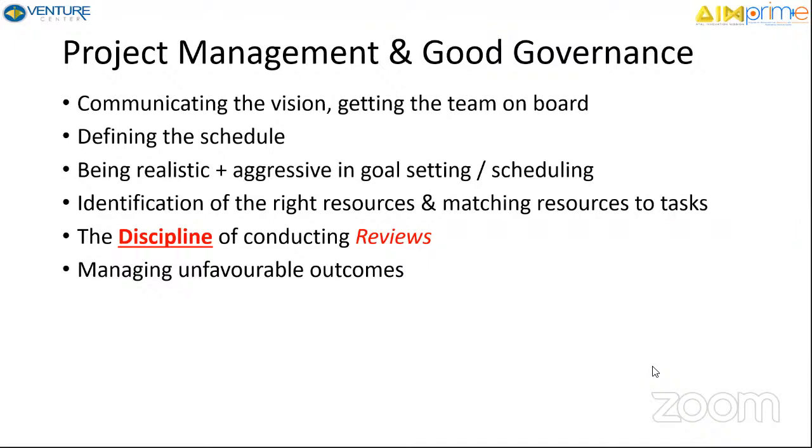And because it's a critical path activity, if that prototype, if that PCB doesn't come, everything else is delayed. The casing is already here. Other components are already here. Everything is here. But if this thing doesn't come 3 weeks from now, our prototype will be delayed. Prototype is delayed, investor meeting delayed. If you put the dates there, you'll see the cascading effect.